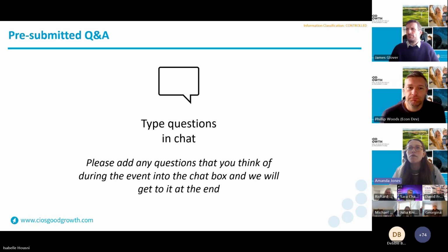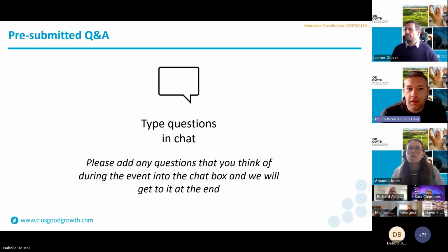Thank you. Question number 14. In the monitoring and evaluation plan, we will be doing this quarterly and ongoing with the participants. How would you like to see this documented on the claims form? Please provide quarterly in arrears. So if you are delivering 5 jobs in claim 1, for example, the form should show 5. Then if you are delivering another 5 in claim 2, then you should update to say 10 jobs. So delivering a cumulative total. I'll get that word out.